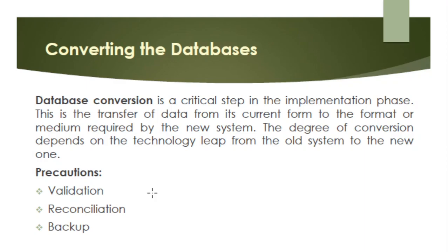First, you have the validation, wherein your old database must be validated before conversion. This requires analyzing each class of data to determine whether it should be reproduced in the new database. Second precaution is reconciliation. After the conversion, the new database must be reconciled against the original one. And the last precaution is backup. Original copies of the files must be kept as backup against discrepancies in the converted data, especially if there may be mishaps or lapses when you transfer the data. So, at least you have something to go back to.